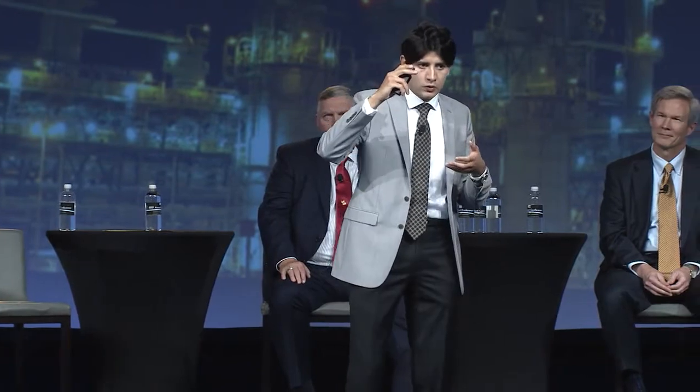And then we asked the experts from our expert-based study to rate the likelihood of occurrence and the relative impact of each of these 88 causes. Using this information, we calculated a risk index for each of the causes. And then we used some statistical methodologies in order to categorize these causes in different risk tiers, so that risk tier number 1 has the most risky causes of out-of-sequence work, followed by risk tier number 2, 3 until 6, as you can see in the figures here. And our data showed that the top 2 risk tiers consist of the 10 causes that we should pay attention to the most. And Jim will illustrate more about that from the industry's perspective.